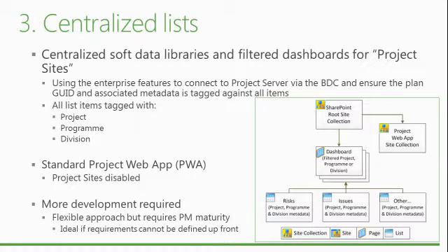We'll talk more about what you can do in terms of other enterprise features as well. But as this gentleman here quite rightly said, there are some caveats to this. Before I go into that, to make this truly work, you want to stop project sites from being created. That's a setting in PWA. And as you'll see as we go down this approach, for nice consistency and integration, to make it a nice user experience for end users, it is going to require a lot more development. You will need a developer. But you might get more of the result that you want at the end.